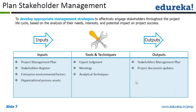Once the analysis is done, you move into planning stakeholder management. You develop an appropriate management strategy to effectively engage stakeholders throughout the project lifecycle based on the analysis of their needs, interests, and potential impact on project success. Inputs are the project management plan, stakeholder register, EEF, and OPA. Expert judgment, meetings, and analytical techniques are the tools. Outputs are project document updates and the stakeholder management plan.